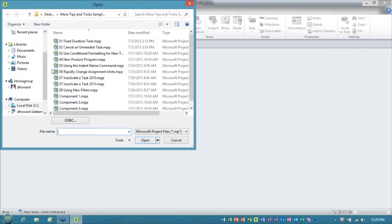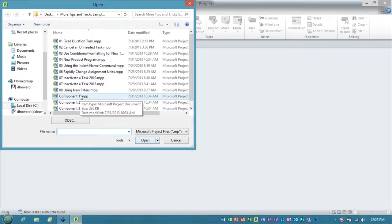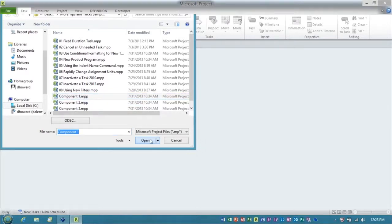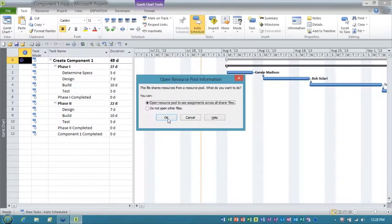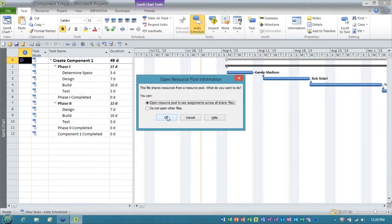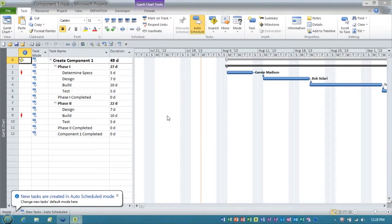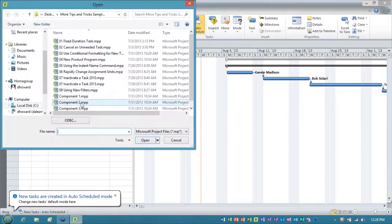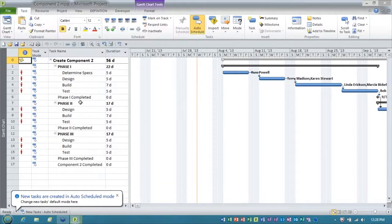What you do is you open the projects that you want to appear in the master. So I've got three projects, they're called component one, and they're tied to a shared resource pool file because I'm not working with Project Server.